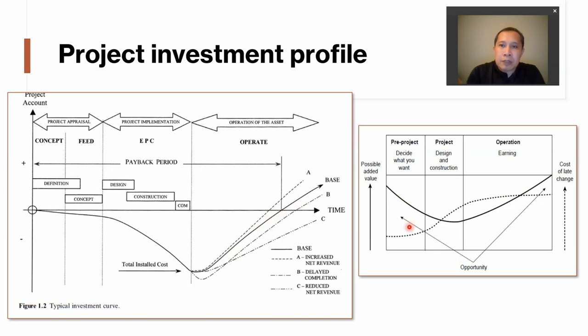Okay, so imagine when you're doing your plant design project, your tugas air rancangan pabrik, we call that a basic design or preliminary design. Okay, in which it's very easy, it's very cheap to change the design while it is on the conceptual stage. However, when you start to purchase the main equipment for the plant, then it gets much more expensive to make any changes to your design. In fact, hopefully you're not making any substantial change in the design when you start to procure equipment for your plant, right? This all makes sense.